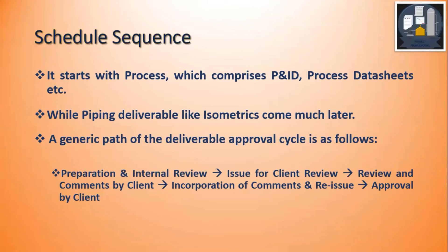A generic path of the deliverable approval cycle is as follows: the deliverables are prepared and internally reviewed by the contractor, then issued for client review. The client reviews and provides comments, which are returned to the contractor. The contractor incorporates the comments as appropriate and reissues to the client for approval.